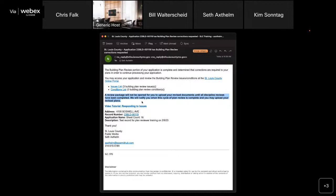until all the reviews for that given cycle have completed, at which time you'll receive another notification letting you know that the full cycle is complete and the portal has been opened back up. And at that point, you can provide all your responses to comments and resubmit any corrected documents. So in this case, just the building plan review is completed and has some comments that you can go ahead and review. You can start preparing your documents, but you may receive other similar emails for other reviewers, and then you'll receive that final email when the cycle itself has completed.